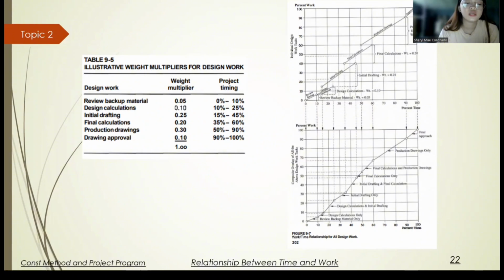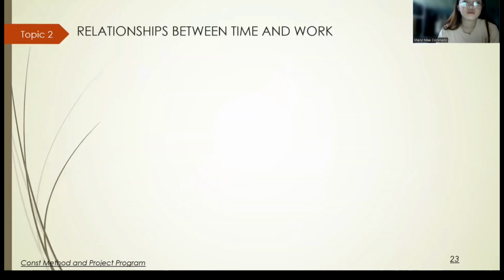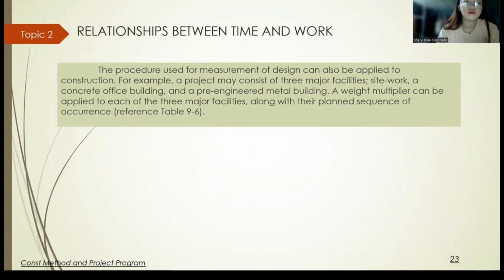Construction involves many types of different work that have different units of measure, such as cubic yards, square feet, pounds, or each. Thus, it is convenient to use percentage as a unit of measure for planning, measurement, and control of overall construction. The procedure used for measurement of design can also be applied to construction.